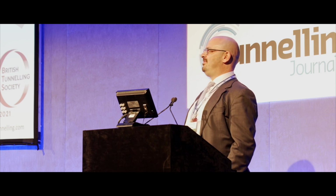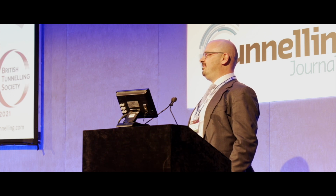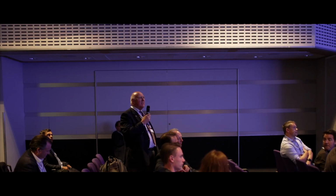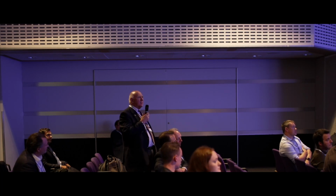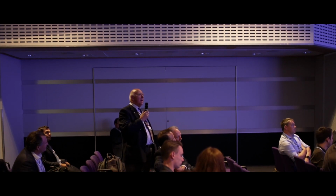Donald Lamond, Hyperbaric and Tunnel Safety Limited. I've been around for quite a long time in civil engineering, and my first job on site was in the mid-1980s, when material costs were going up very rapidly, and we had the famous Baxter indices. A contract was broken down into concrete, steel, timber, asphalt, various different materials, and each month an index of the price was published, and you did a sort of weighted average and applied that to the fixed rate in the contract. So perhaps with inflation as it is just now, we might be coming back to revisiting the Baxter Index principles.